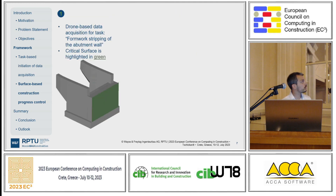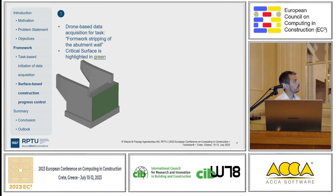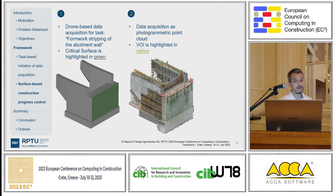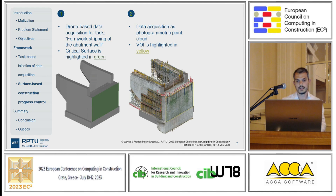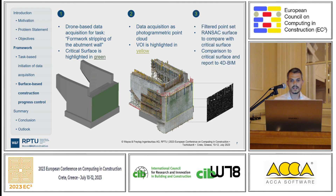This was verified by a case study. Here we see a bridge abutment wall for a bridge in Bochum, Germany. The drone-based data acquisition was carried out for the task of formwork stripping of the abutment wall — imagine there is a lot of formwork which was removed. The critical surface is highlighted in green. Here you see the point cloud acquired by a DJI drone with a lot of pictures, computed in Metashape from Agisoft software. The volume of interest is highlighted in yellow. Here is the filtered point set of the point cloud for the volume of interest, which can then be compared to the critical surface and the information reported back to the 4D model.